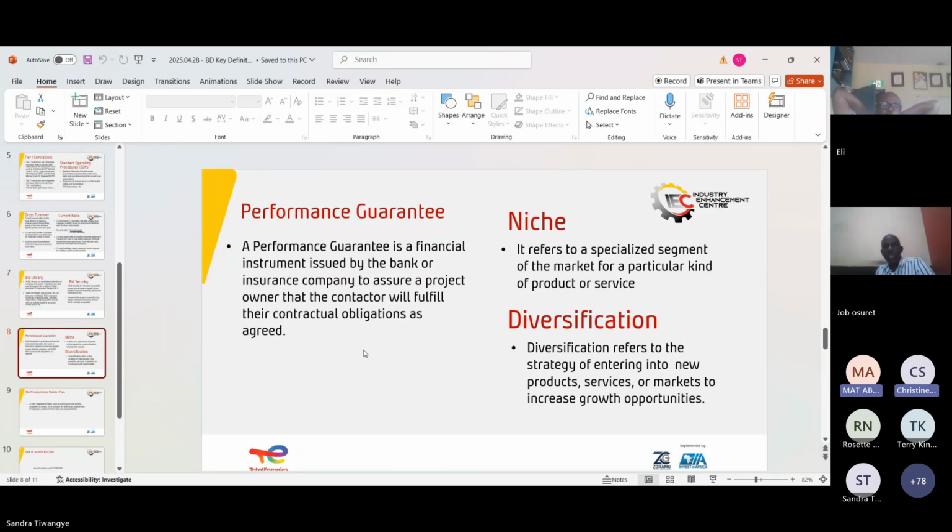So if you're able to determine that you've finished the phases either within time or even before the deadline, those are measurements that can show you how well you've been performing. And usually you have checks and balances with your clients where they sign off to certify that you've actually achieved these targets. So those are examples of performance measurement indicators.